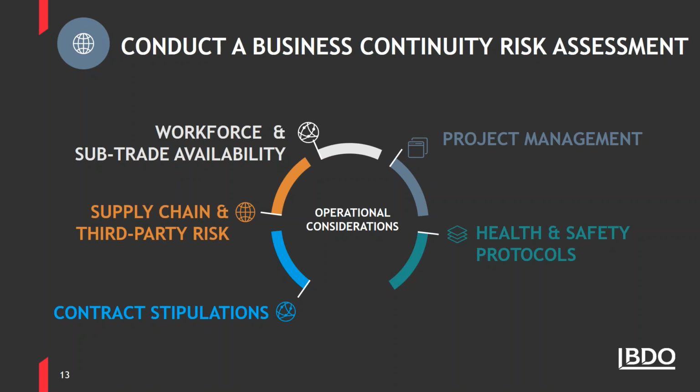For project management, to be honest, right now it's about documentation. I cannot stress enough to document as much as you possibly can. It's so important to segregate COVID-19 related changes, delays, and impact compared to normal course project delays. You will need to carefully and precisely track the impact of COVID-19 on specific projects themselves. Maintain a paper trail and ensure that you're maintaining that paper trail consistently across your projects.